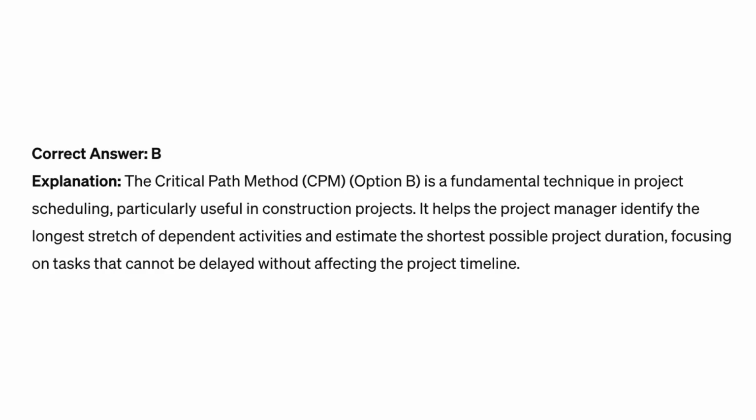Correct answer B. Explanation: The critical path method, CPM, option B, is a fundamental technique in project scheduling, particularly useful in construction projects. It helps the project manager identify the longest stretch of dependent activities and estimate the shortest possible project duration, focusing on tasks that cannot be delayed without affecting the project timeline.